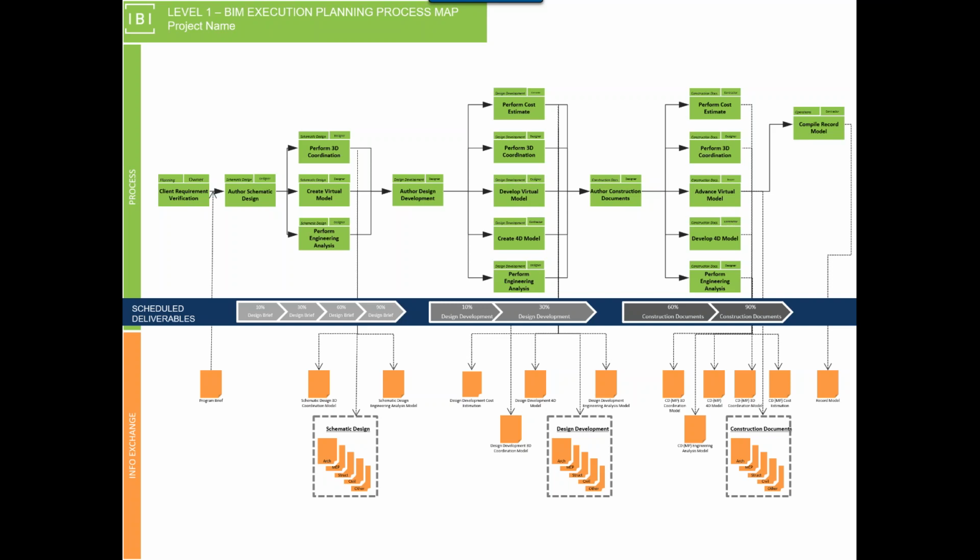I need it. So it's making sure, as a BIM coordinator, you say to an estimator, well, you're not getting quantities at 10% design. You're going to have a big contingency of what you're guessing. At 60% design, you'll have better quantities. And it's common sense, but common sense sometimes disappears when we're applying technology, and there's the assumption that, well, now that I, quote, have Revit, it will do all these magical things for me, and we're completely void of project delivery, when we're designing, what's been designed, and all of those fundamentals of actual design projects that bleed into construction that still apply regardless of the fact that they are BIM.